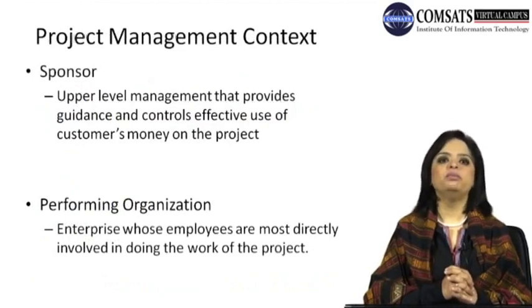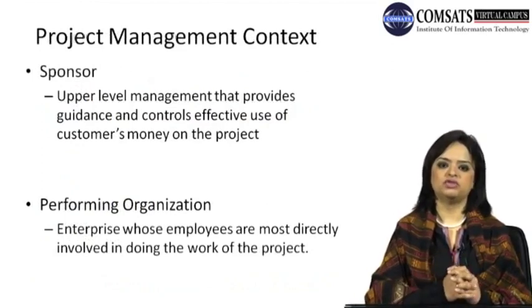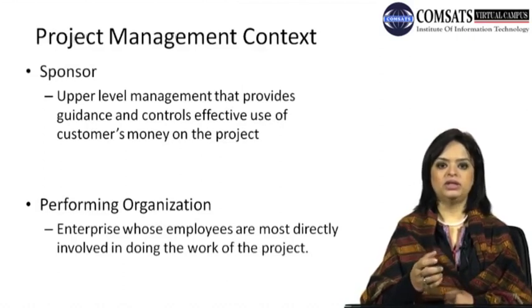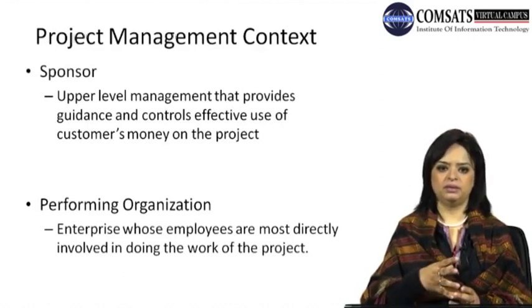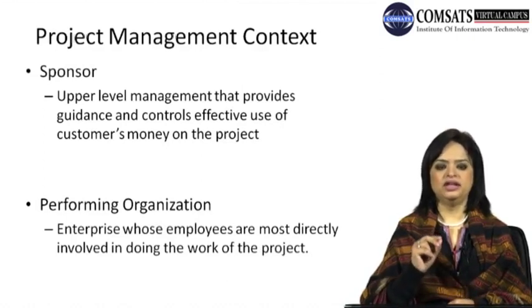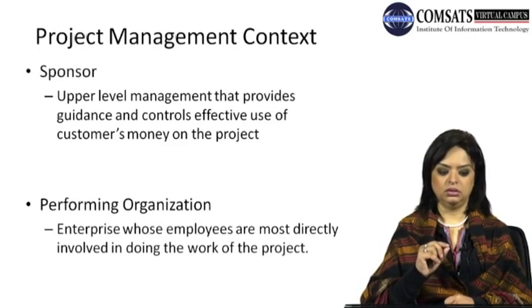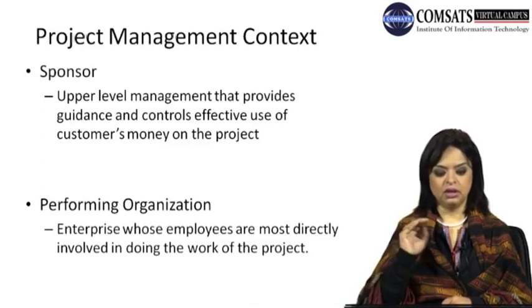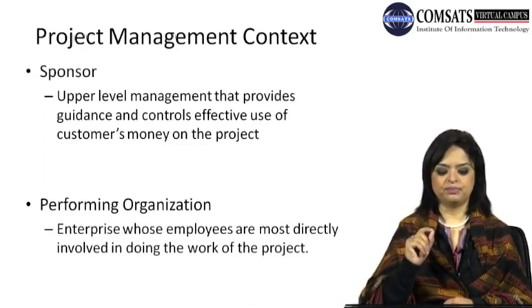An important concept that a lot of people get wrong, when I ask the definition of a sponsor: because we use the word sponsor in relationship with provision of money or finances, we tend to use the word sponsor as anybody who gives you money. That is not the definition in the project management world. Sponsor in project management lingo is the upper level management. It has to be upper level management, so it is upward communication, that provides guidance and also controls effective use of the customer's money on the project.